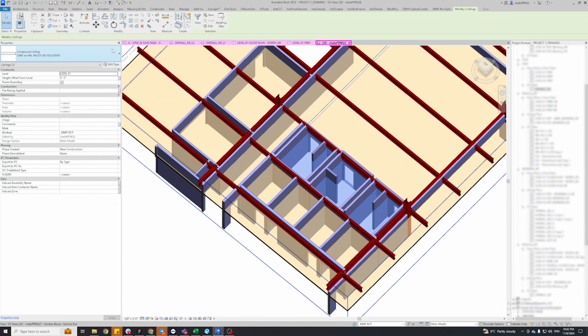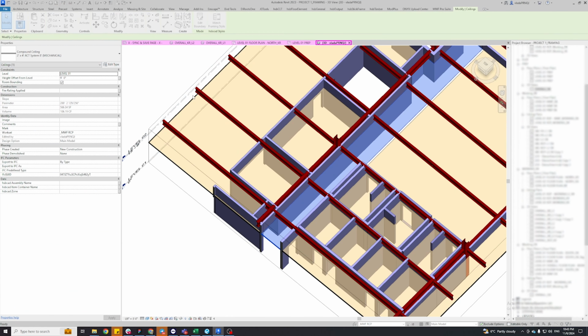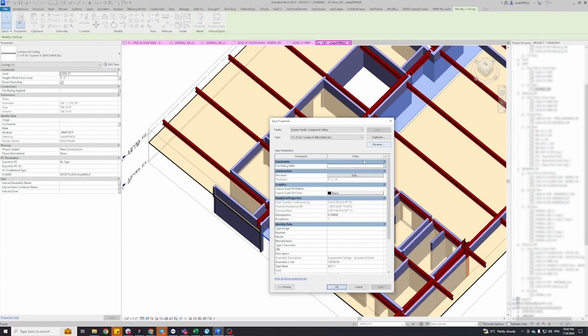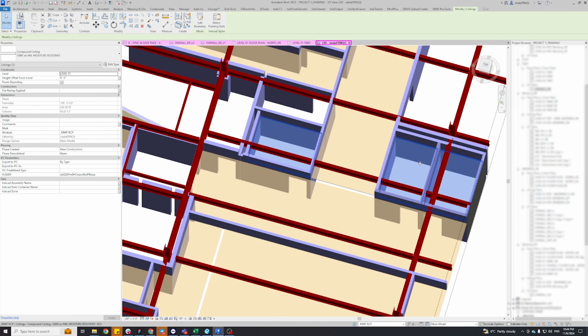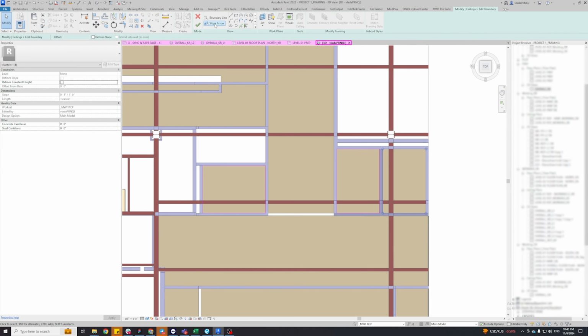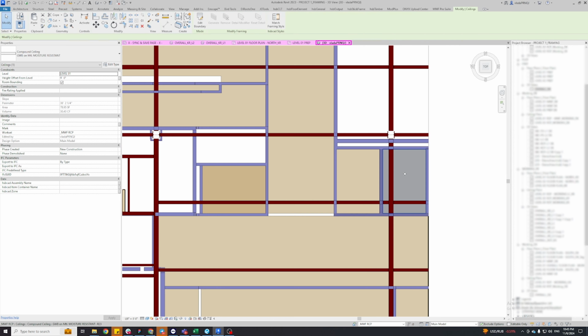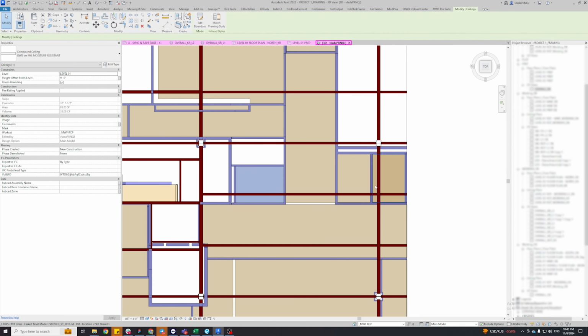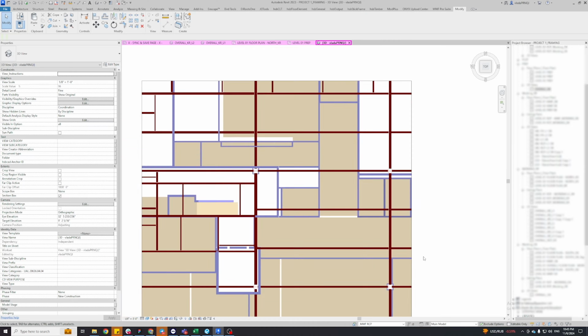When all of the walls are done, we can go on to the ceiling and check the type and height to ensure that the drawing set is followed. We also inspect the ceiling structure to ensure that it is in accordance with the drawings and the right ceiling joists are placed. Another key aspect of the MWF is the single profile in one ceiling. Thus, we are examining and adjusting the correct ceiling profile because sometimes the architectural model has multiple profiles in one ceiling. We even created a script for splitting them into several profiles automatically.